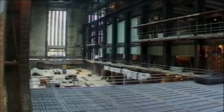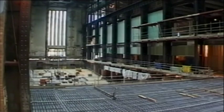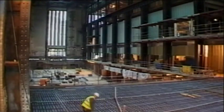As the turbine hall wall is filled in around where the balconies will go, the glass is being processed in a tortuous journey around Europe. The basic glass is manufactured in Spain. It's toughened, heat-soaked, laminated in Spain. It then travels to Austria, where it has the sandblasting treatment applied. It then travels to Germany to have the protective coating applied, back to Austria where it has the fixings applied, and then it's crated and shipped here, so it's well-travelled glass.